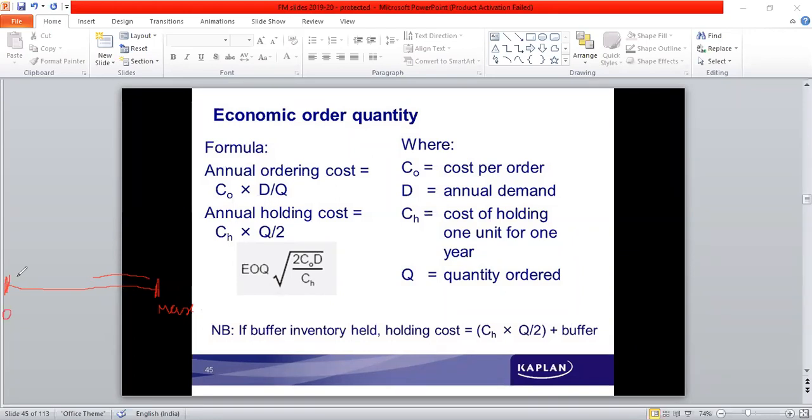Let's take a simple example, say that 10 days' time is required for the procedure to be completed and the material to be received from the supplier. That 10 days' time has a term, called lead time. During that lead time, whatever consumption is required, how many units are required during this lead time, they should have available even before they reach zero units, so at least maybe 10 days of inventory level should still be available.